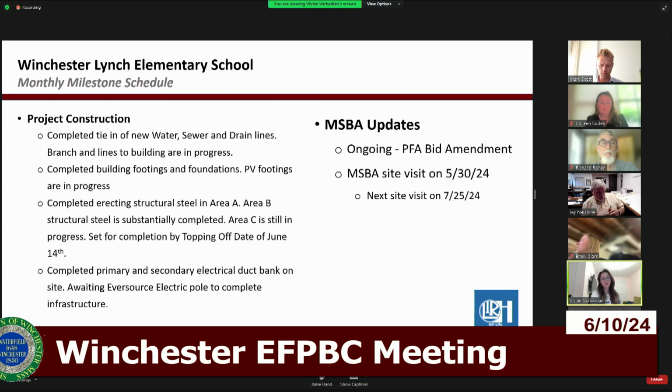We've been working and completed primary and secondary electrical duct banks on the site. All we're waiting for is Eversource to complete their electrical poles in order to finalize the infrastructure. As far as some MSBA updates, we are still waiting to learn from the MSBA for the PFA